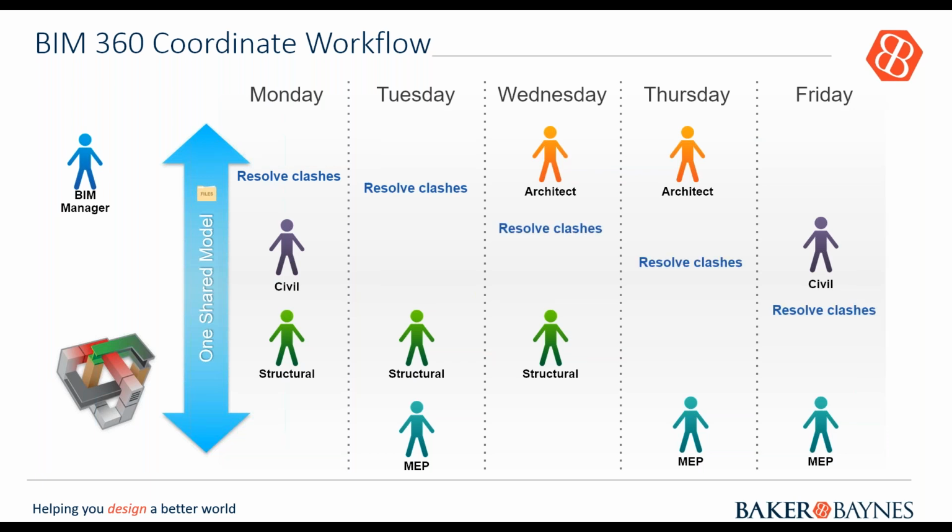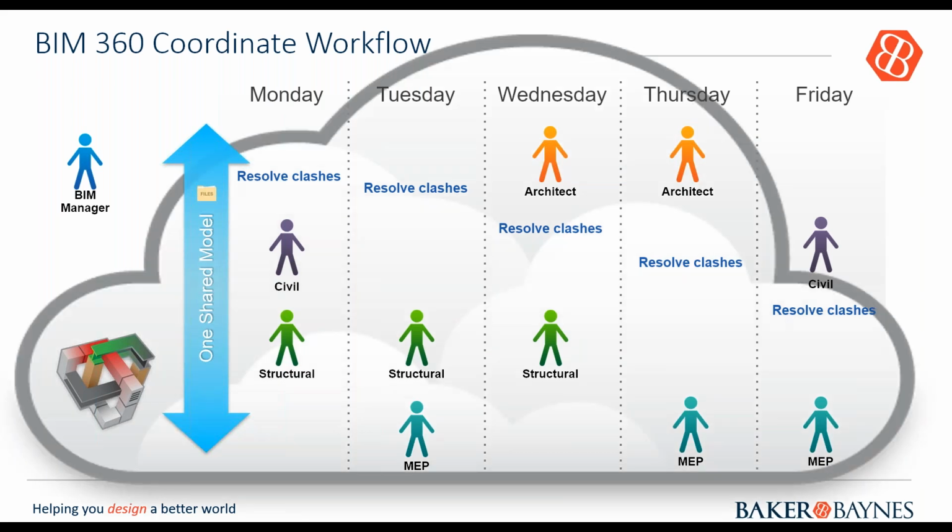Resolve clashes. At some point, everybody wants to meet on a certain day and just goes through the items that they've accomplished or resolved, and the BIM manager needs to make sure that he manages all these processes together. This is done in the cloud, and the idea in the perfect world would be not for one person to be doing these clashes, but for each individual to take ownership of their model and do their clashes, and then meet at some point to go through what's been done. The BIM manager manages the processes and probably would want to be included in these meetings that happen daily.